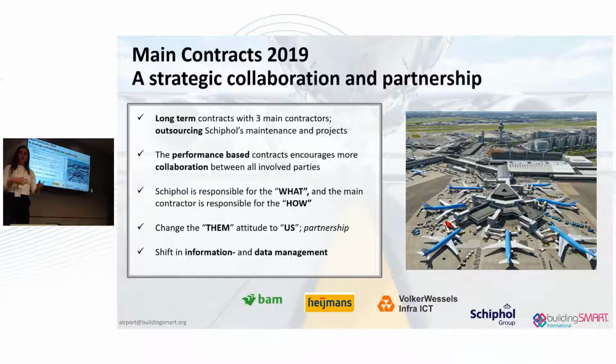On the next slide, I'll show you a little bit how we are doing that. But the contract is performance-based, and it really encourages the collaboration between all of the parties involved. That's a very different way of working, especially from an airport perspective, but that's what we've been working on for the last 3 years. It's a long-term contract, for 9 years, and every 3 years we reevaluate how the contract party is performing, if they're doing their work like they're supposed to, and then they'll renew the contract for 9 years.